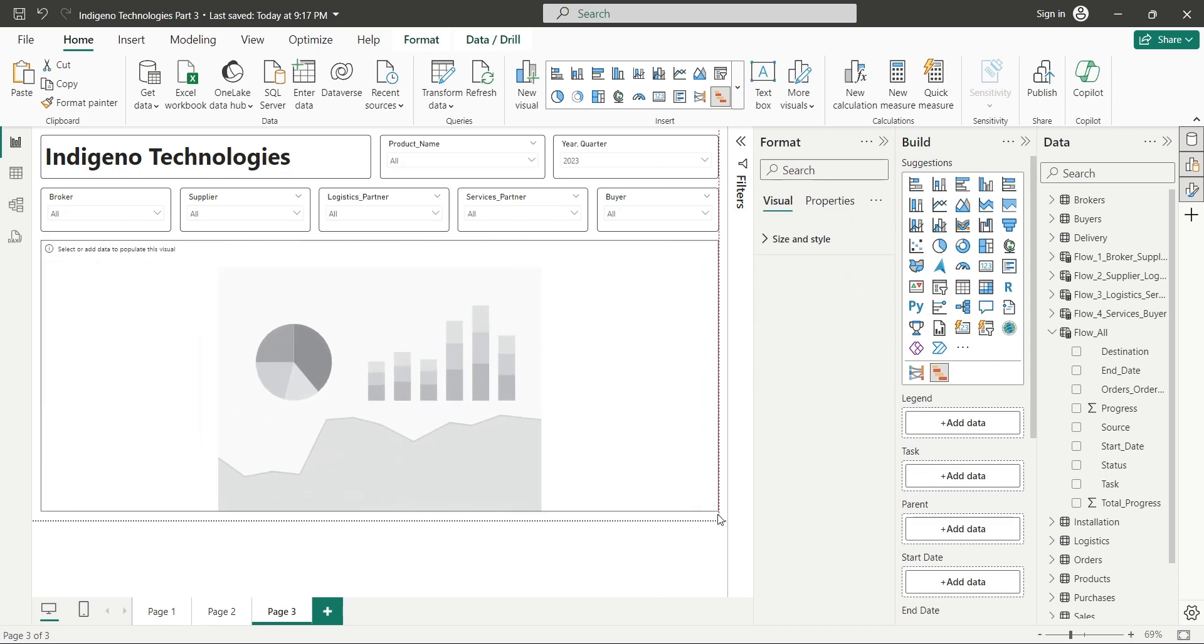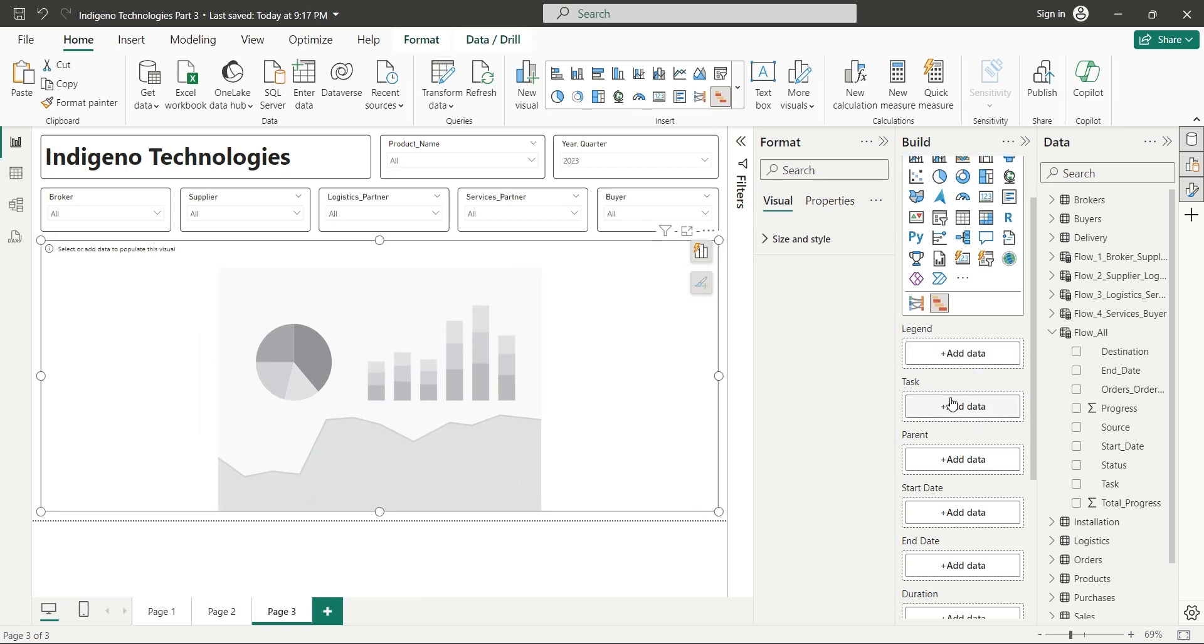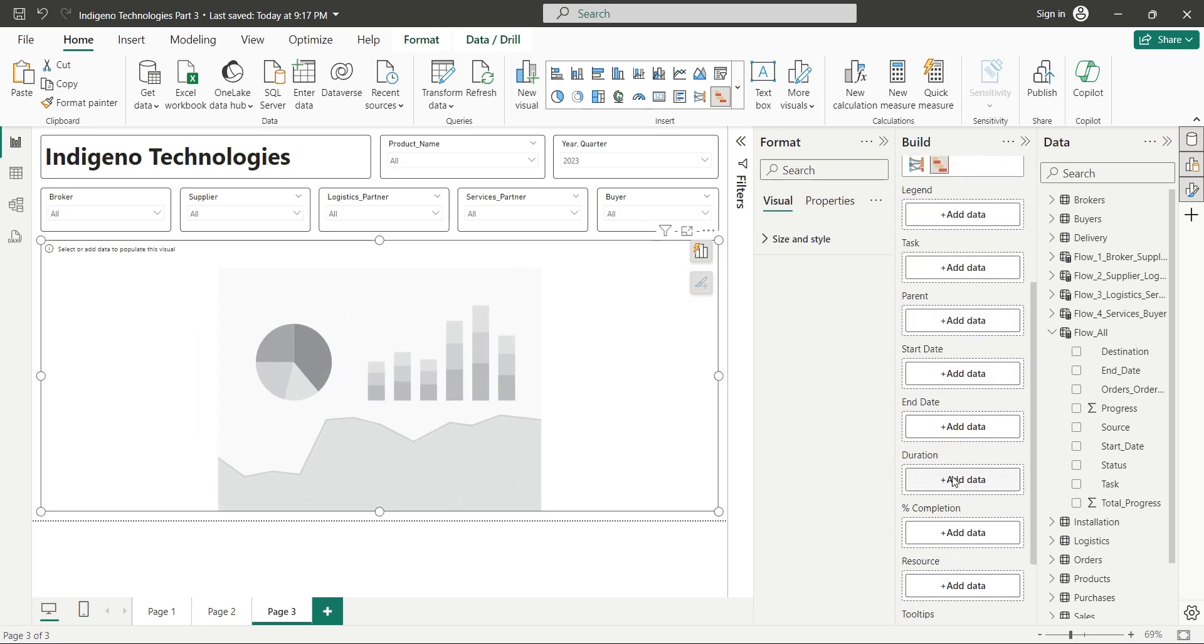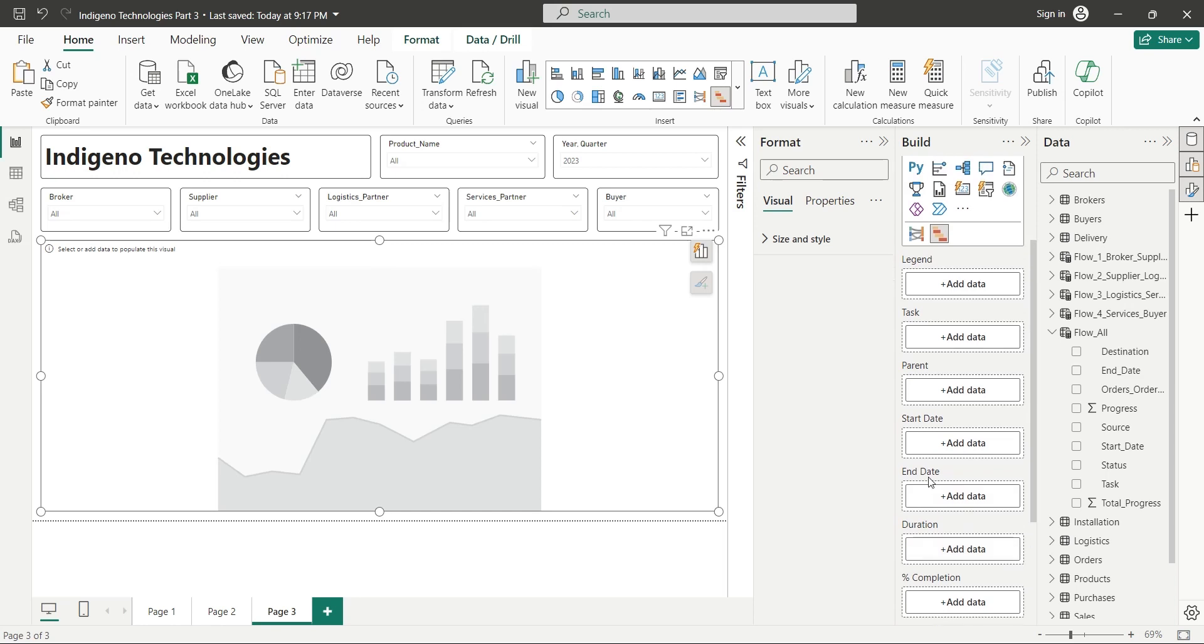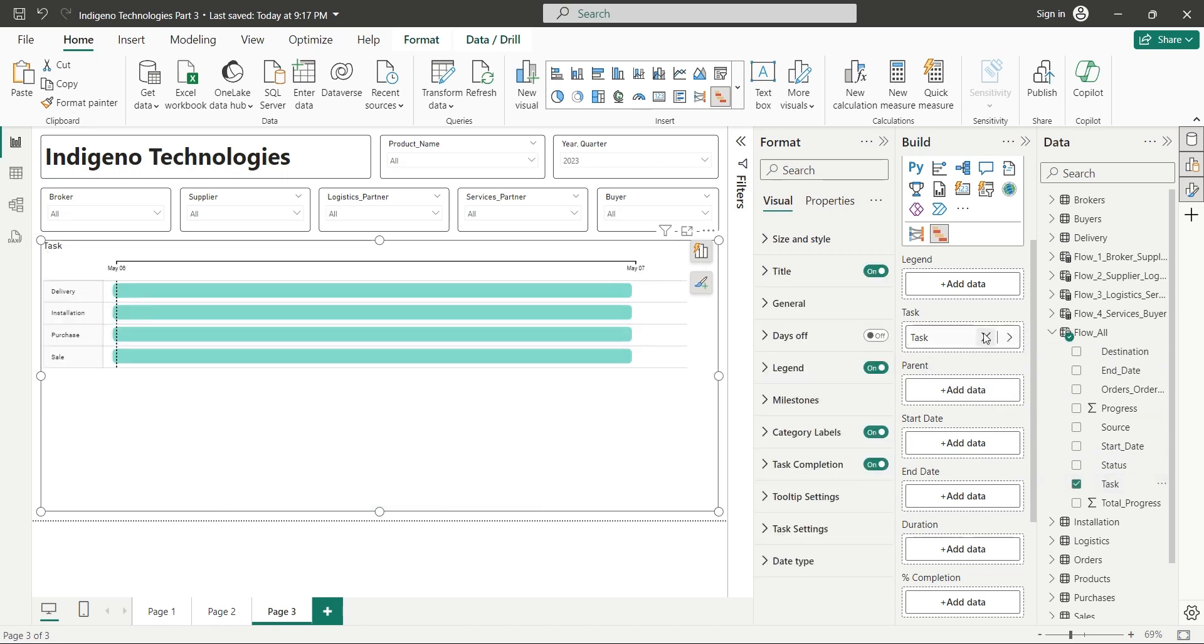We will add the Gantt chart now and place it in the empty area on the dashboard. We will use all columns we added in today's tutorial such as task, start date, end date, progress in this Gantt chart. First of all, we will add the task field to the task. Now we have all four tasks: purchase, delivery, installation, and sale in our Gantt chart.